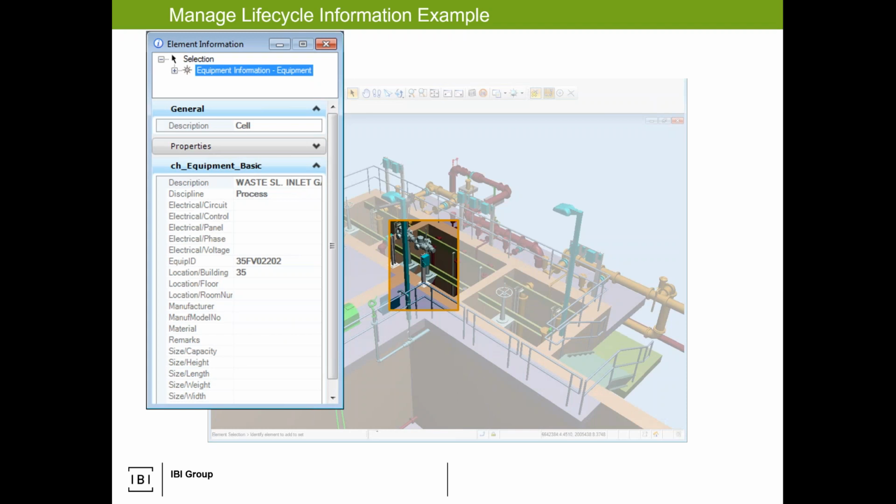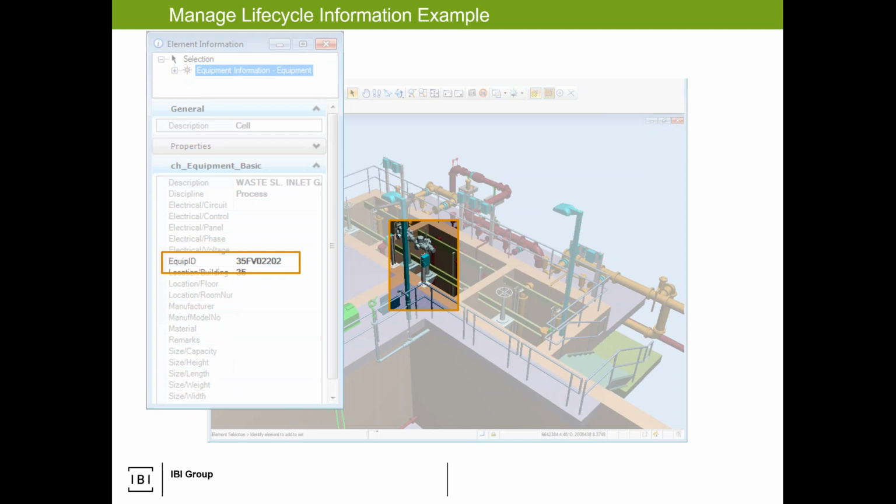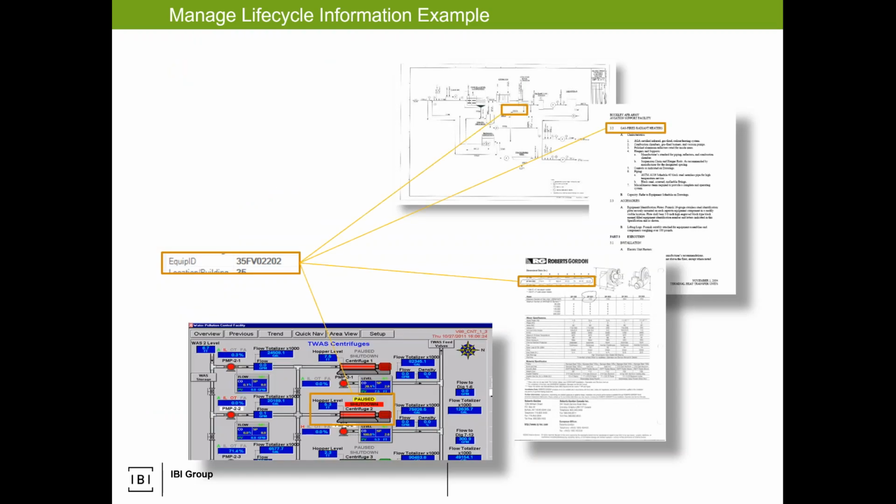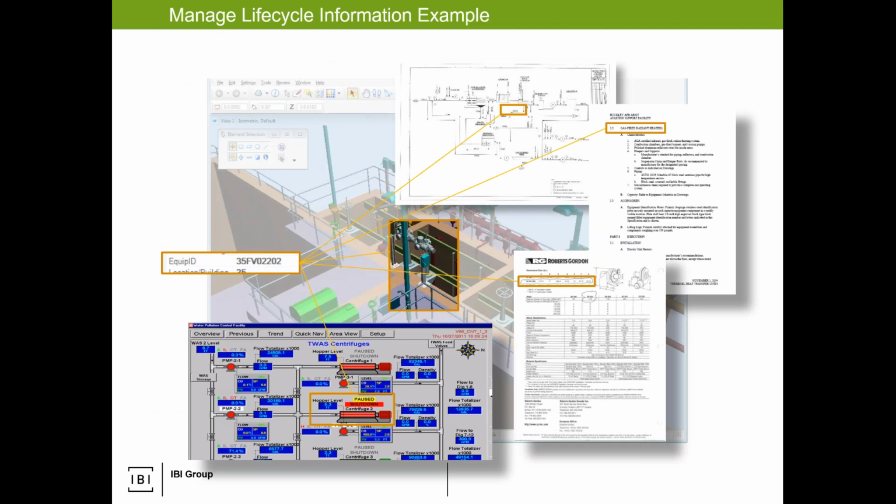And I noticed one of you put that myth there as well: not all the data gets jammed into the model. And that's 100% true. So this concept of life cycle information, the data has an identifier, and the identifier is your gluing mechanism to tie it to all the other potential sources or outputs of information that's obtained throughout the life cycle of the project. And it all comes full circle and has that mode of connectivity that then allows us to either build operational interfaces or build connecting ties to go back to understand what was designed and produced, what was actually installed, what's being operated, and what are those gluing mechanisms to tie everything together.